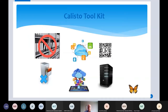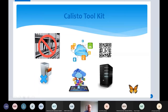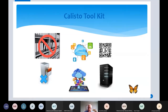Moving on from filing cabinets and rolled-up drawings - we want to get to a cloud solution where you use tablets and phones with QR codes, barcodes, or RFID. With the cloud, we can automatically back this up in real time to a server in your client's office, so if there's a problem you have the up-to-date information in your control. During the construction phase, the information should in our opinion be held by the client, not the construction team.